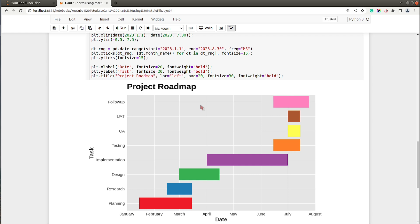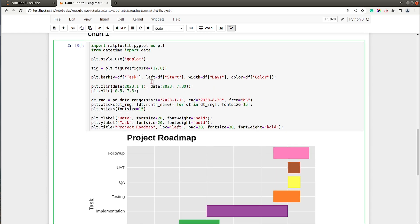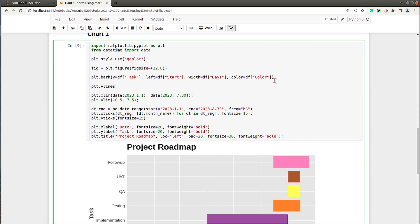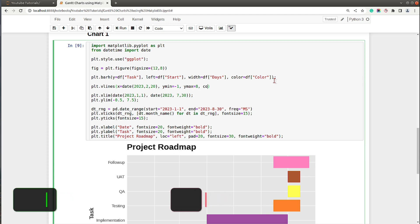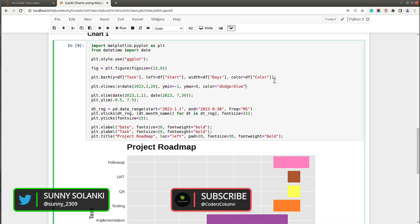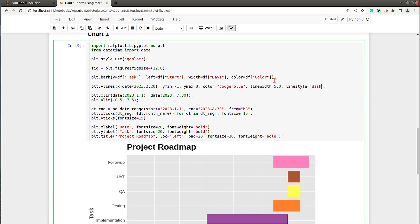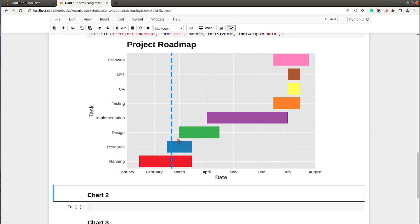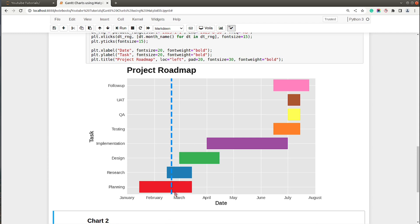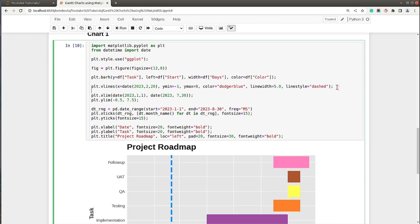Generally people also add one vertical line showing where we currently are in the timeline, so let's add that as well. I will use `plt.vlines` where the x-axis value will be the current date — `date(2023, 2, 20)` — y-minimum will be minus 1, y-maximum set accordingly, color set to 'dodgerblue', line width to 5.0, and line style to 'dashed'. Now we have a vertical line in our chart showing we are currently on February 20th.